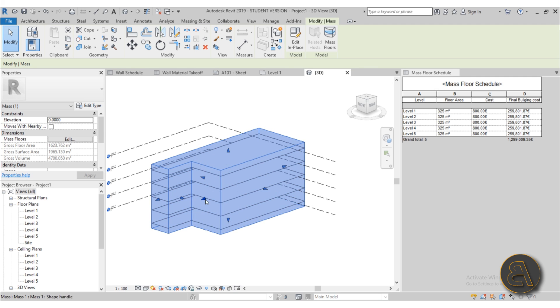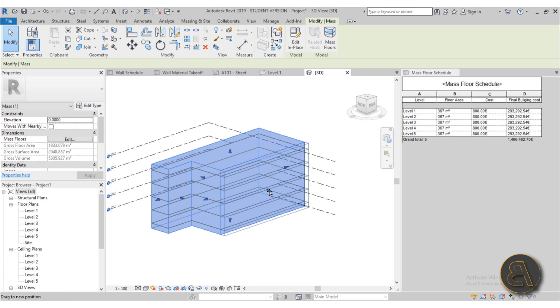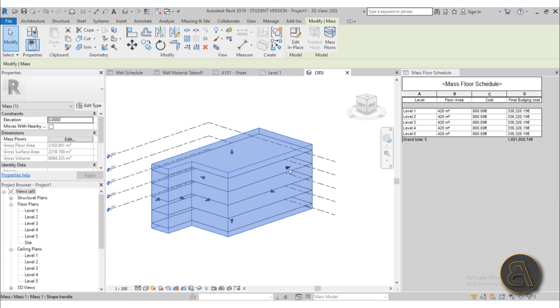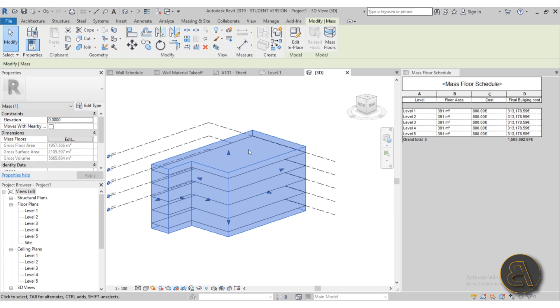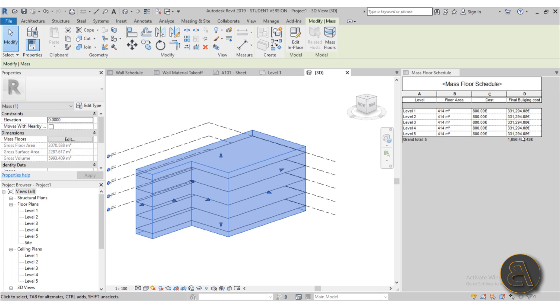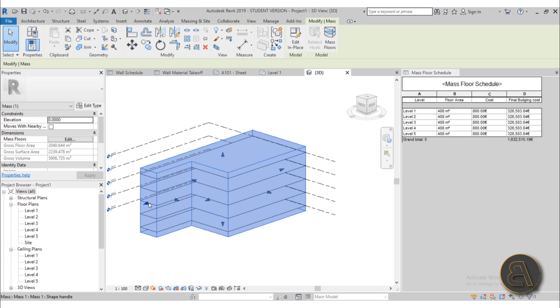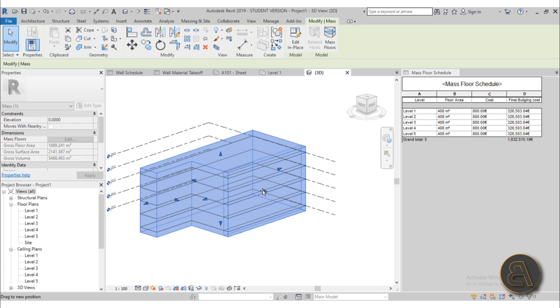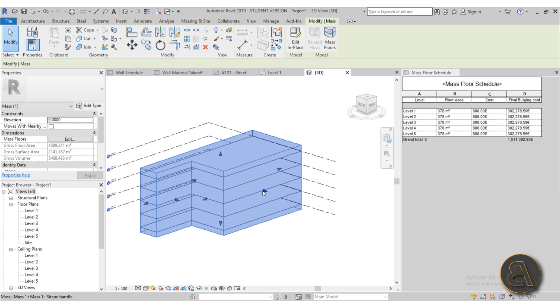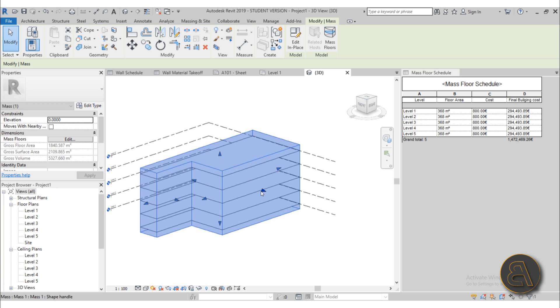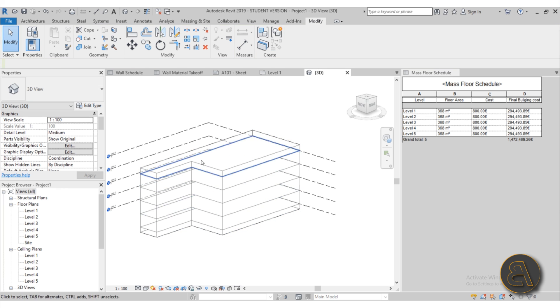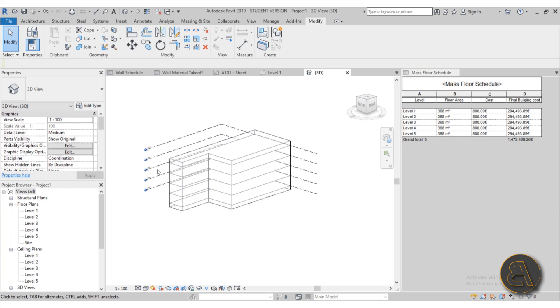So you can actually make informed design decisions using this schedule and it's extremely parametric. So here just changing dimensions, the schedule changes and here we have the final price. So if the client says maybe go to 1.5 million, I can maybe make this smaller, make it smaller over here, and there we go we're getting closer to 1.5 million. Okay so there we go, that's another option that I show you how to set up and do in Revit.